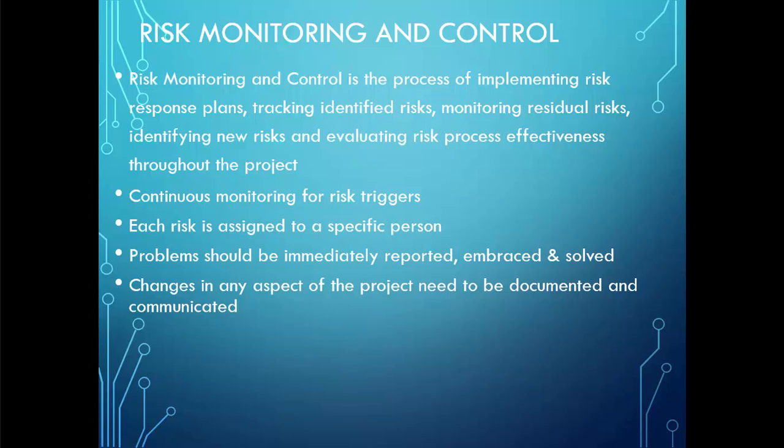Changes in any aspect of the project need to be documented and communicated, identifying who will have the authority to approve a change and who will be notified of what changes and when, and who is responsible for that response or that problem. A written form to track hardware, software, and document changes will be used.